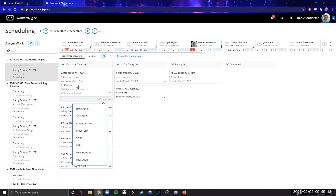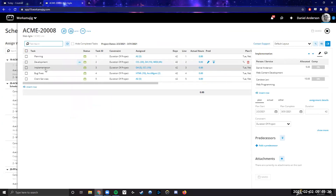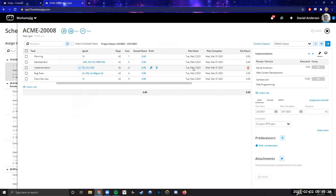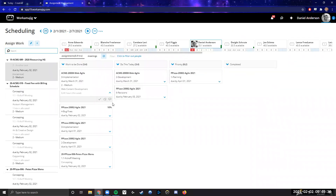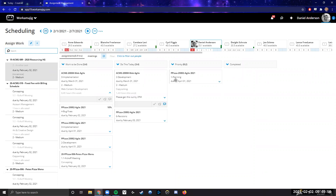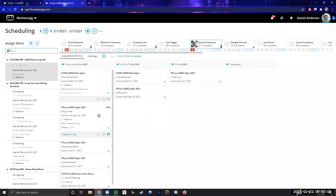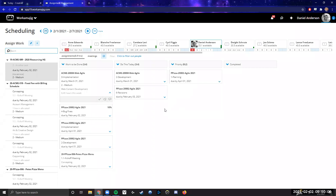Regarding how tasks flow from the schedule into this page: if a task says it's due on March 31st, the reason it's pulling into the assignment management page for this time period is because on the project schedule, that task starts this week and runs through March 31st. The system sees activity on that task in this time period and places it into the bucket of tasks. Importantly, if a task isn't scheduled to be due today but is moved into 'Do This Today,' it does not change the schedule. We don't change plan dates by moving between columns — only marking something as completed will change the actual plan complete date.